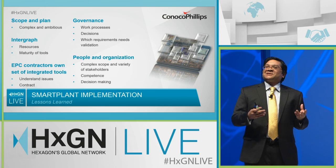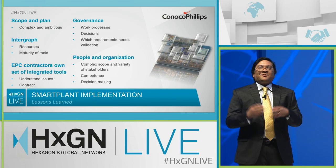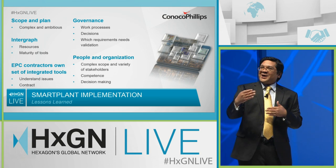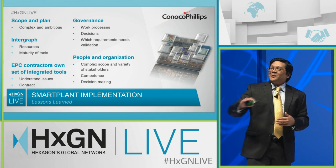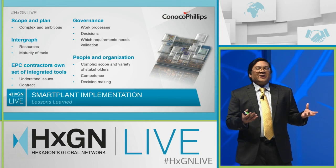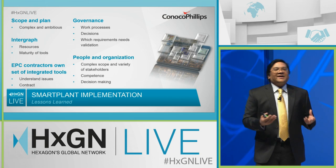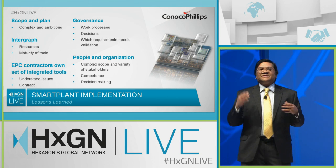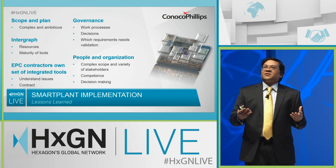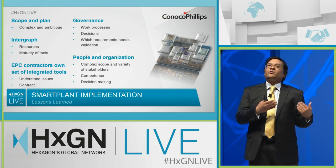That was a mistake, because it took a lot longer than we thought for those features actually to be implemented. So part of that lesson, going back to the scope and plan, is plan where your software actually is and not where it may be in the future. The other thing in our relationship with Intergraph was just the resources. At first, the resources that we had were really more attuned to a traditional contractor-client relationship. When we asked them to do things, they did them, coding and bug fixes, things like that. But that's not what we needed.